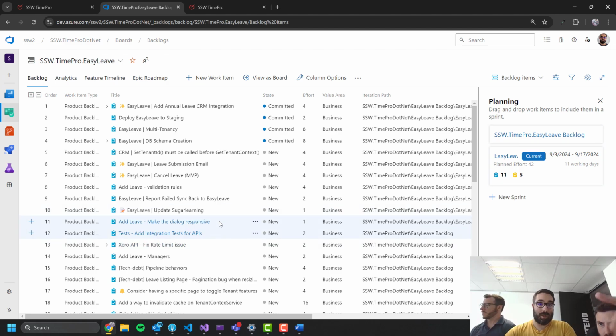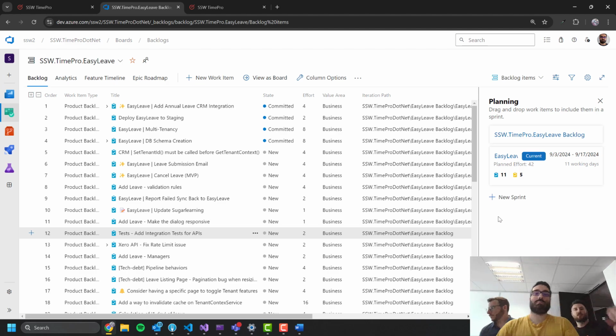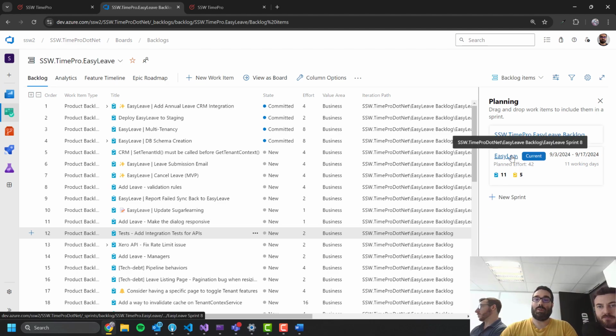Yep. So that's 42 points. That's a week's worth of work for one person. No, that's 4 times 5, that's 20. So that's 2 weeks, 2 man weeks, 10 man days. That's what we've got. Perfect. Done. But we know she'll work slowly, so the rule is not to come to... Okay. Cool. Done.